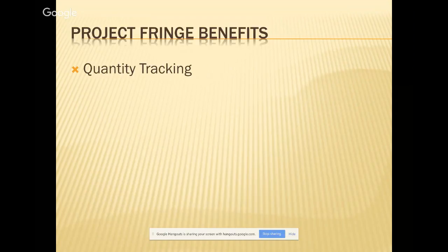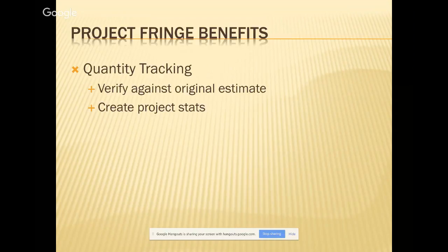And I can look at trends like that 20% of the way into the project or 30% of the way into the project. It was a huge improvement based on our traditional method, which was waiting for our job cost report to be issued by accounting, and which didn't include quantities and was 2 months behind. By the time the billing cycles came through, the information was at least 60 days outdated. So verifying that, using it against the original estimate to see how far along in the project you are is a huge benefit. The other one is predicting future projects.